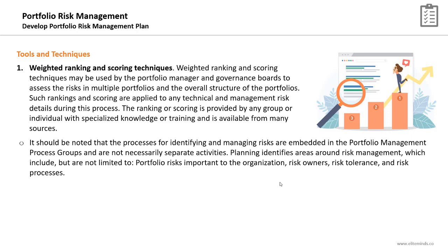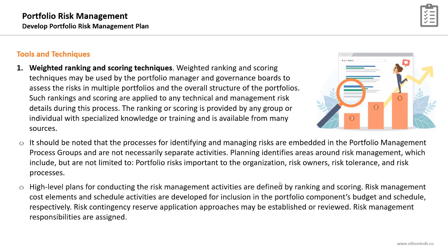portfolios. It should be noted that the process for identifying and managing risks are embedded in the portfolio management process groups, and it's not necessarily separate activities. You need to consider risk management in each of the portfolio management processes. Planning identifies areas around risk management, which include portfolio risks important to the organization, information like the risk owners, risk tolerance, and risk processes. High-level plans for conducting the risk management activities are being defined by ranking and scoring as